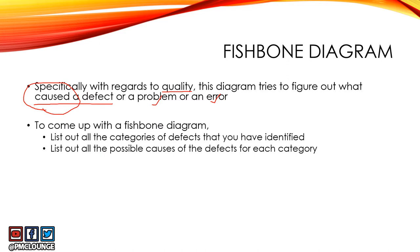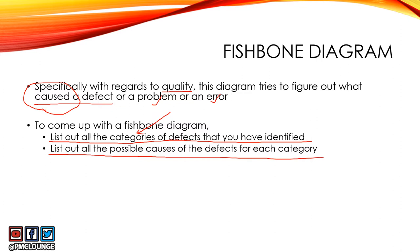To come up with a fishbone diagram, step one is to list out all the categories of defects you have identified. For example, if you have 20 defects, list them out in categories — say five categories under which those 20 defects can fall. Step two is to list out all the possible causes of the defects for each category.